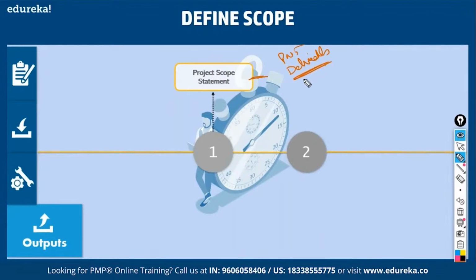So we come up with a lot of deliverables. These are all interim deliverables. Then the final deliverable will be the pen that we're going to prototype. So it defines all the deliverables. It tells you what the acceptance criteria are. How do you get this deliverable accepted by the customer? What are the tests you have to do? What are the test results you provide him?